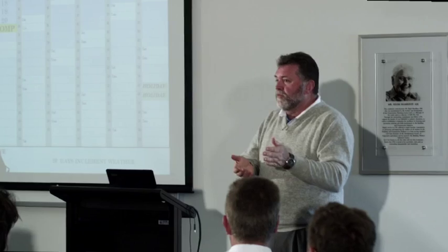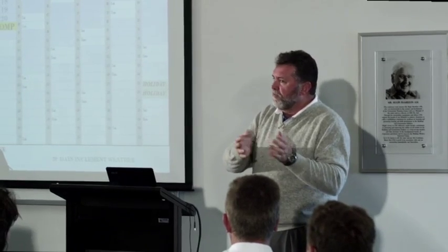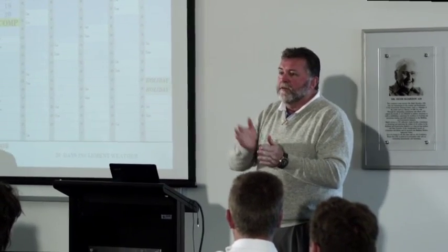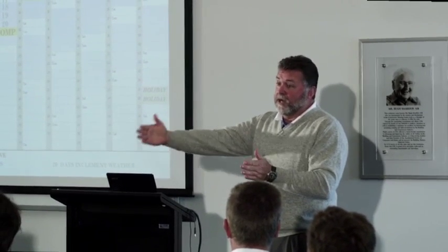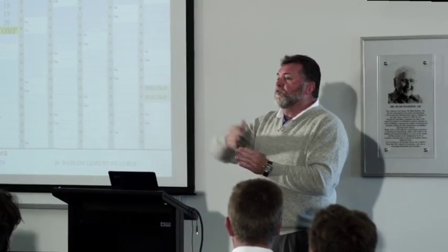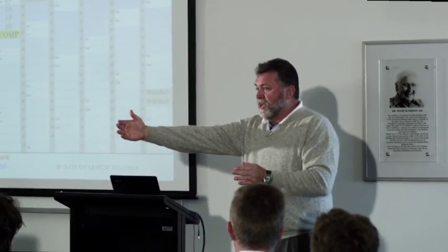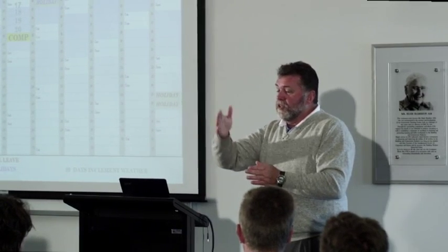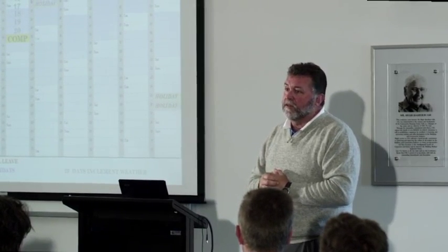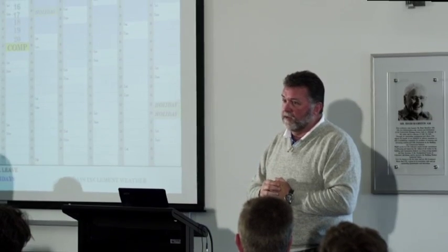If you fail to give the document, say by a few days, Paul is correct. Your cooling off period will start when you give it to them. So now you've delayed your start, for a start. If, for example, you give it to them at the end, or even say at the frame stage, the owner can actually terminate the contract. Now you've got a world of pain. Don't do that. You're in breach.